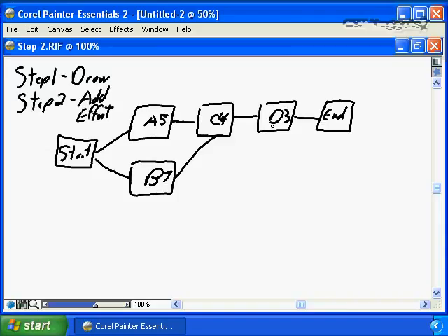Now, having been through the majority of this Nugget series, I know you will appreciate that some of those conditions I have stated for drawing this simplistic network diagram to demonstrate the principles of network diagramming are not realistic. No one is ever available 100% of their time to work on projects. We need to make allowances for sick, for vacation, for unavailability.